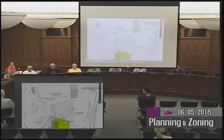As I mentioned, we had been through some of the other commission approvals. We're planning to bid the site work coming up later this month. We are looking at separate bids, one for the canopy, one for the structural and site work. And the reason for that is really just a cost savings measure. The town can purchase the canopy directly, as well as looking at project schedule. It's about a three and a half month lead time on getting the structure fabricated and to the site.